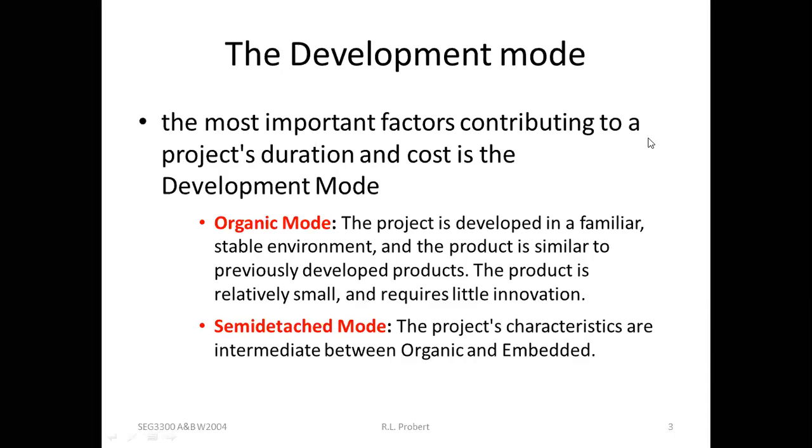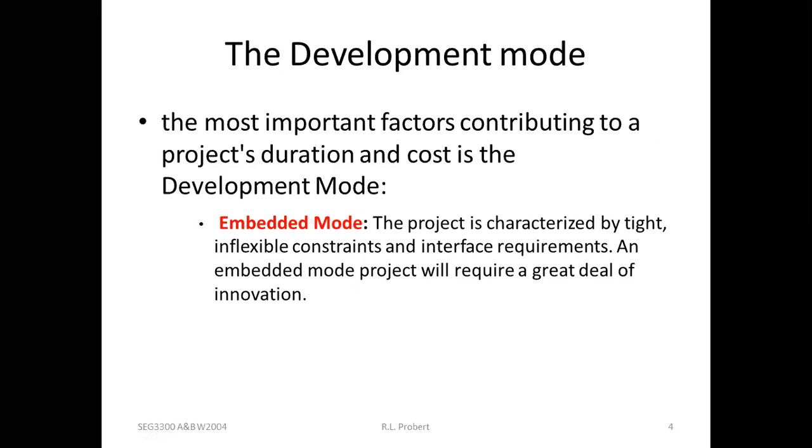Now, semi-detached mode. The project's characteristics are intermediate between organic and embedded. And embedded mode is one in which the project is characterized by tight, inflexible constraints and interface requirements, and that project requires great innovation. कोई नया project है, innovative है, we need to follow the embedded mode.